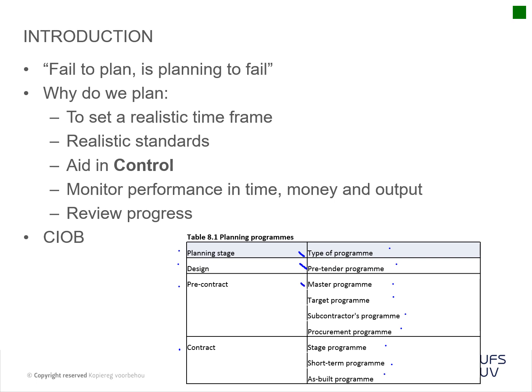You have a master program which includes your design phases up to completion of the project — basically stages 1 to 6. Then you have your target program with specific targets to be met — for instance, one section of a building has to be complete before tenants can go in. Then you have subcontracted programs and your procurement program. Your contract programs include stage programs, short-term programs, and the as-built program at the end of the project.